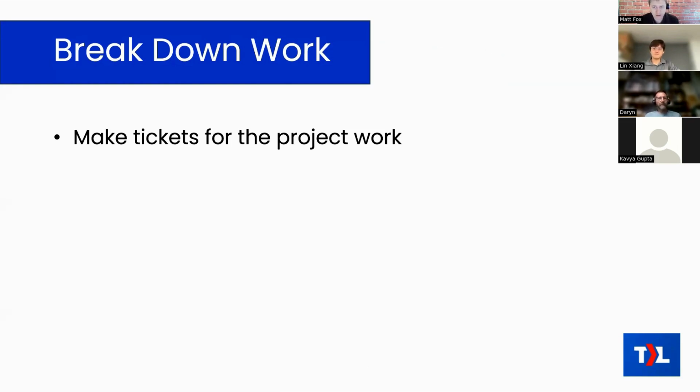In the last couple of weeks, I had a call with an MSP, and they were just wondering how to get started with this. They wanted to know, how do we get started with project management? And they had been making a single ticket for their projects. They had tickets that had 150 hours on them, which is not appropriate for a single ticket when you're trying to manage your project. And so we had to start at a very basic level. So it's not always as simple as it sounds.